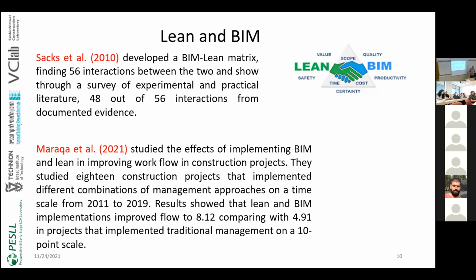Also, Maraqa et al. studied the effects of implementing BIM and lean in improving the workflow in construction projects. They studied 18 construction projects distributed on a time scale from 2011 to 2019. They found that implementing BIM and lean improved the workflow to 8.12 compared with 5.91 in traditional projects on a 10-point scale.